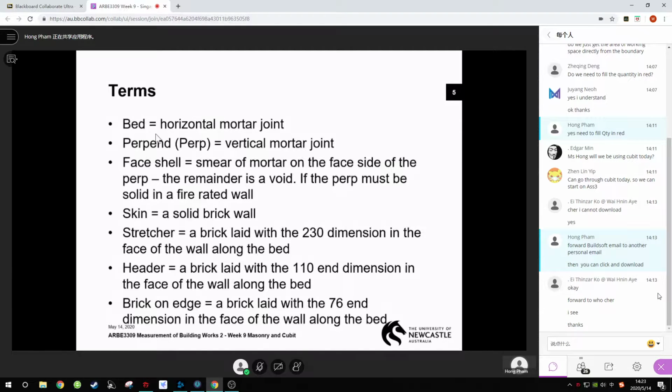Guys, if you are able to understand the descriptions in a BOQ, at least 90% of it, you are very confident. You know what works you are referring to, because at the end of the day you are going to price it. If they say mortar with cement, sand, and silicone, for example, that's very expensive because silicone sealant is expensive. So you must really know and understand the specs. A lot of times students are not confident, especially Asian students like us.